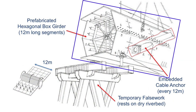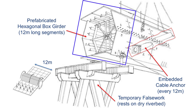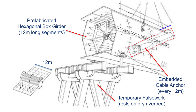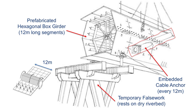This drawing shows one of the 12-meter long segments that were welded together to form the hexagonal steel box girder. Each 12-meter segment included all the necessary stiffeners and attachment plates and also included one pair of embedded cable anchors. Also shown is the temporary false work that was used to support the bridge deck from below during actual construction.